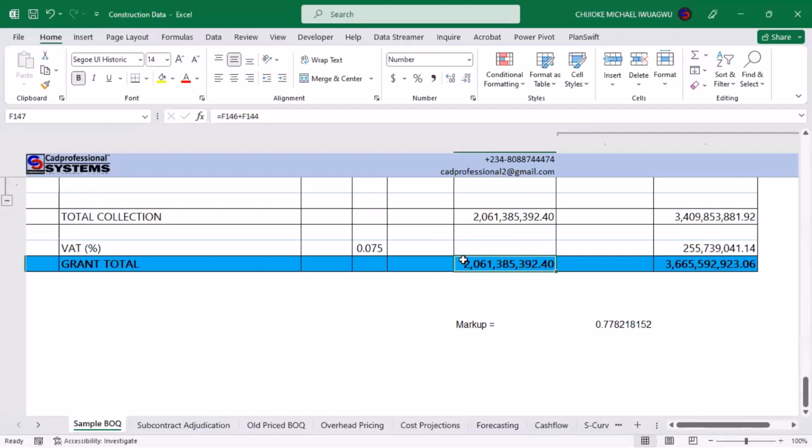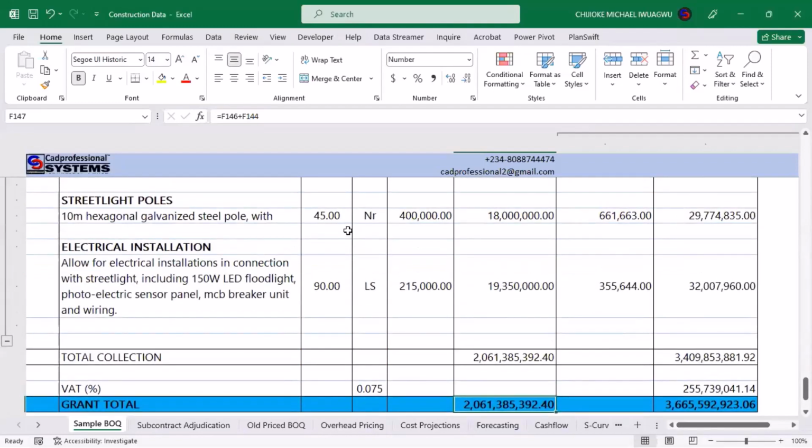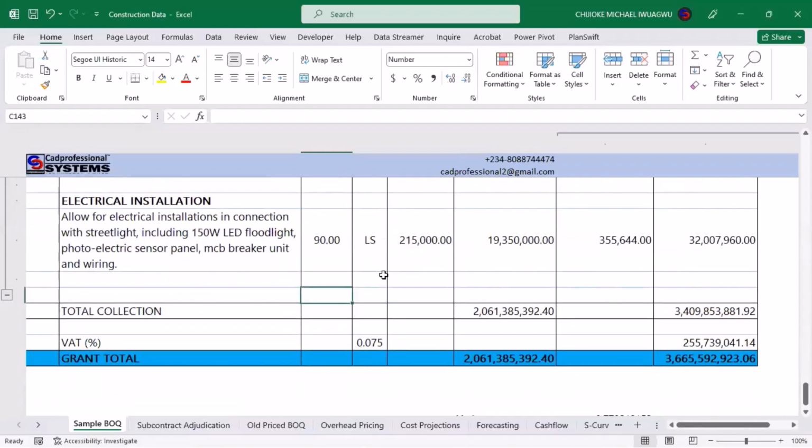Okay, so long as all contractors that are bidding have been categorized to be of the same class, chances are that they will have almost the same overhead within the same region. They have the same expertise within the same region. They have so many things in common. So when they have a lot of things in common, that means their consideration will include some of those basic things when they are determining their actual cost of work. The thing that will be different is when you are applying markup, when you are bringing in things which are unique to them. All right.